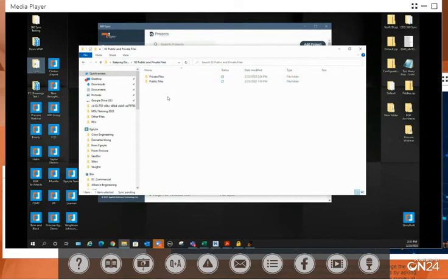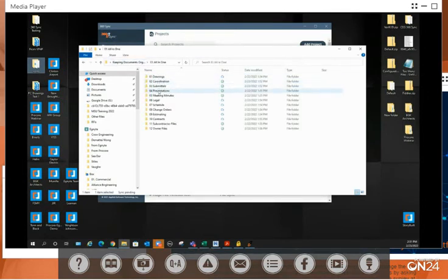What's nice about this one is that you can give certain people or everybody access to the public files, and then you can give only certain people access to the private files. In the all-in-one, if for instance legal, schedule, change orders, and estimating were private, you'd have to apply the same permissions to all 4 of these folders in your document management system. So that could be a bit of a painful thing.